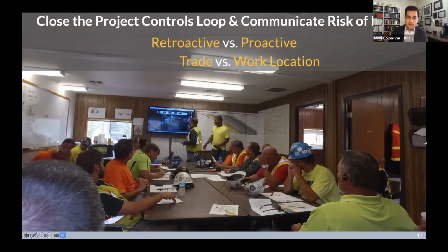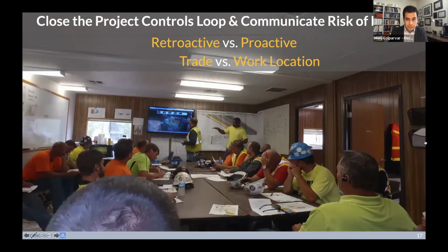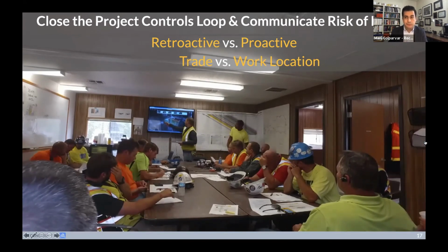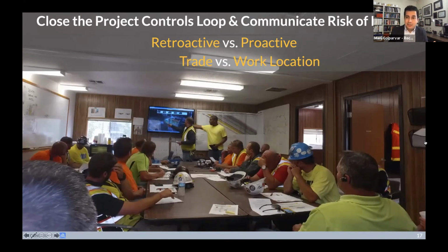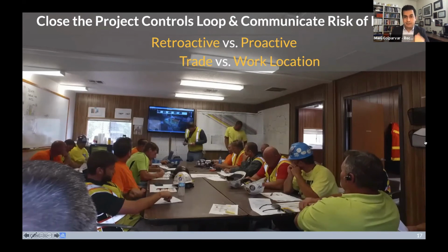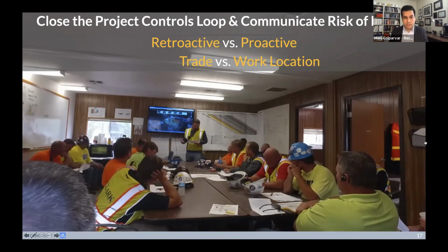We were able to take him from a planned percent complete of 46% to 70% in only 6 weeks. So roughly around 24% improvement. And the platform really doesn't do anything. It shows you where the problems are. And if your team starts taking action, of course, we can close the loop in terms of how we are planning, monitoring, and controlling the job.